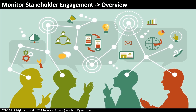This process is in the Monitoring and Controlling process group, but it is not referred to as 'Control Stakeholder Engagement.' When it comes to communication, stakeholders, and risk management, the processes in Monitoring and Controlling are referred to as 'monitor' rather than 'control.' This is because when you are dealing with people or events, you are dealing with factors that are mostly outside your control.